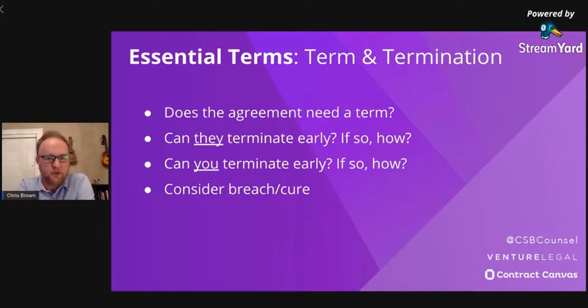And if you're just doing a 2 or 3 week deal, it's probably not a very big issue if they get the right to terminate. However, if you're signing up for, say, 20 hours a week for 6 months, you probably don't want your client terminating after the first month and leaving you hanging, because you might then all of a sudden not have enough work to fill your schedule. So for that reason, I like to have some kind of an early termination notice provision that says that they have to give you something like 30 days notice before they terminate. Or if it's a really long contract, you might ask for 60 days.